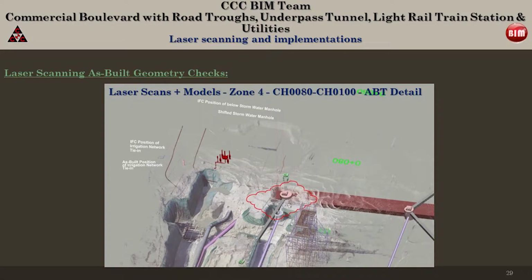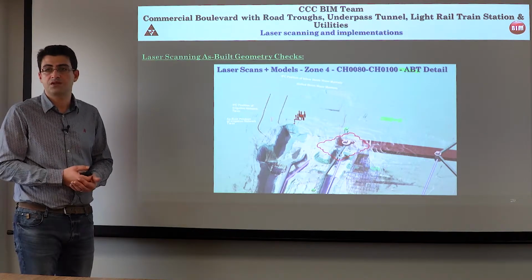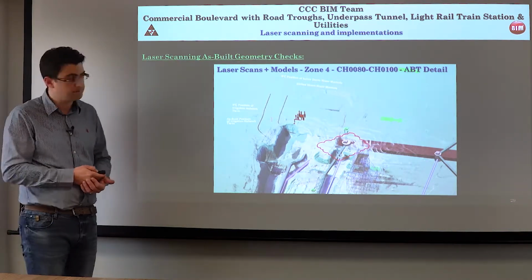On another layout, we can see the changes that happened on site, which were not reported for X or Y reasons. Over here, in the design, there was a manhole that, due to problems in the construction, has been moved over here. The model is going to be adjusted accordingly, and everything is well since we have the consent of our client.